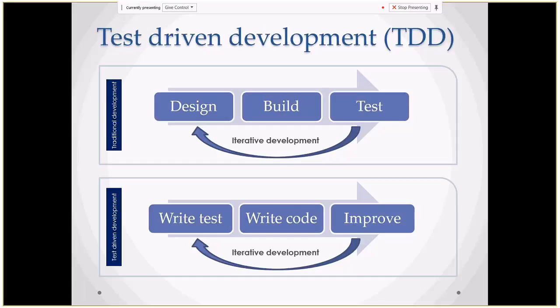So this is what we did traditionally, but now we have moved into test-driven development, where we have started writing test cases first. Once the requirement is there, we'll be writing test cases, and then we'll clarify the requirement. Then only the developers will start writing code. So when developers start writing code, they have clear requirements, because we have test cases as well. If they need to write code in order to pass these test cases, that would be easier for them. When it comes to quality assurance, there will be fewer defects if they write according to the test cases.